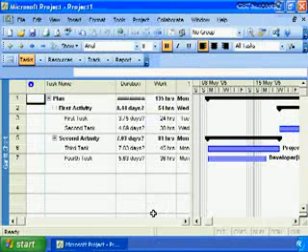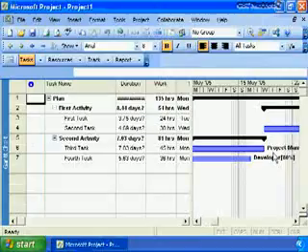Now we're seeing a very different view. Now we're seeing work spread out. We're seeing Microsoft is asking it to do task 3 first, and in parallel, the fourth task is happening at the same time, and that's because the project manager is working 80% availability to complete that task, but at the same time, the developer is free to work, so the work is being assigned appropriately. It's then asking us to do the second task, and then finally asking us to do the first task.